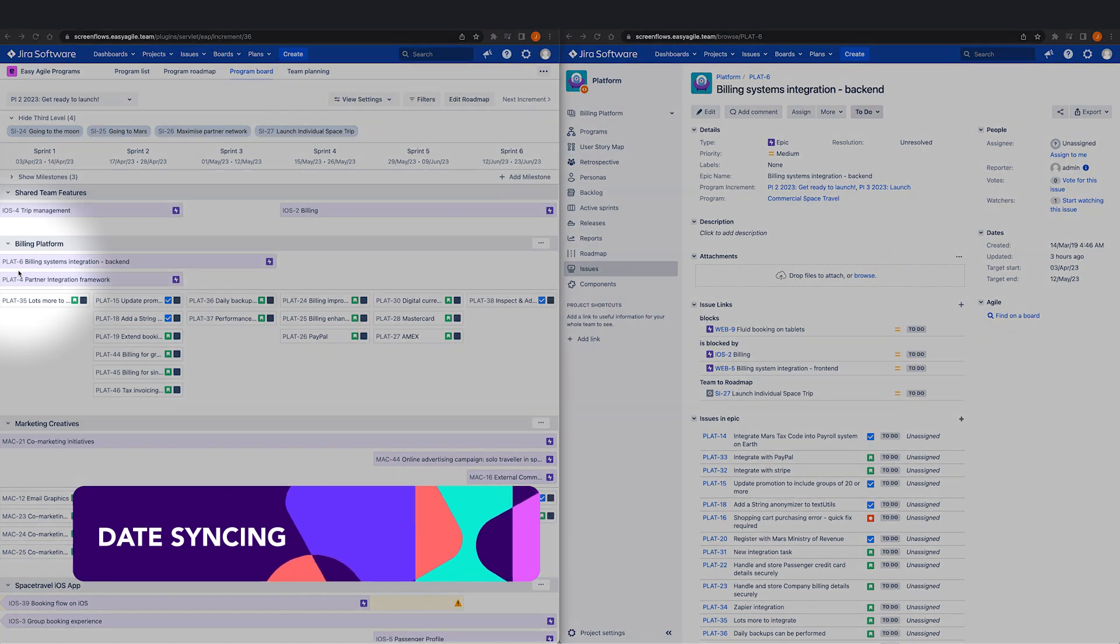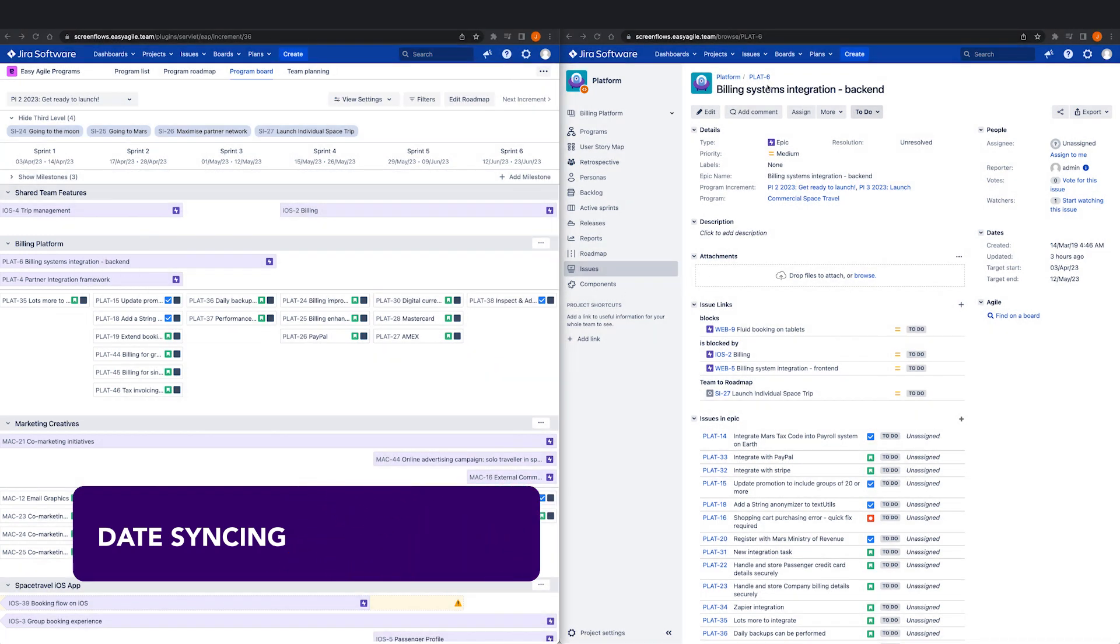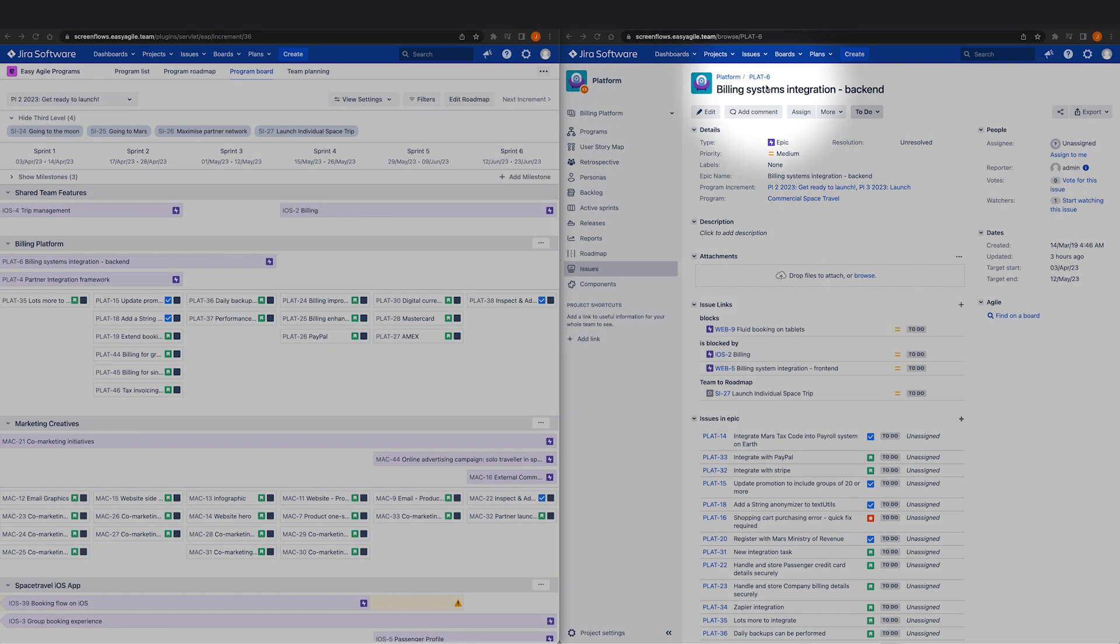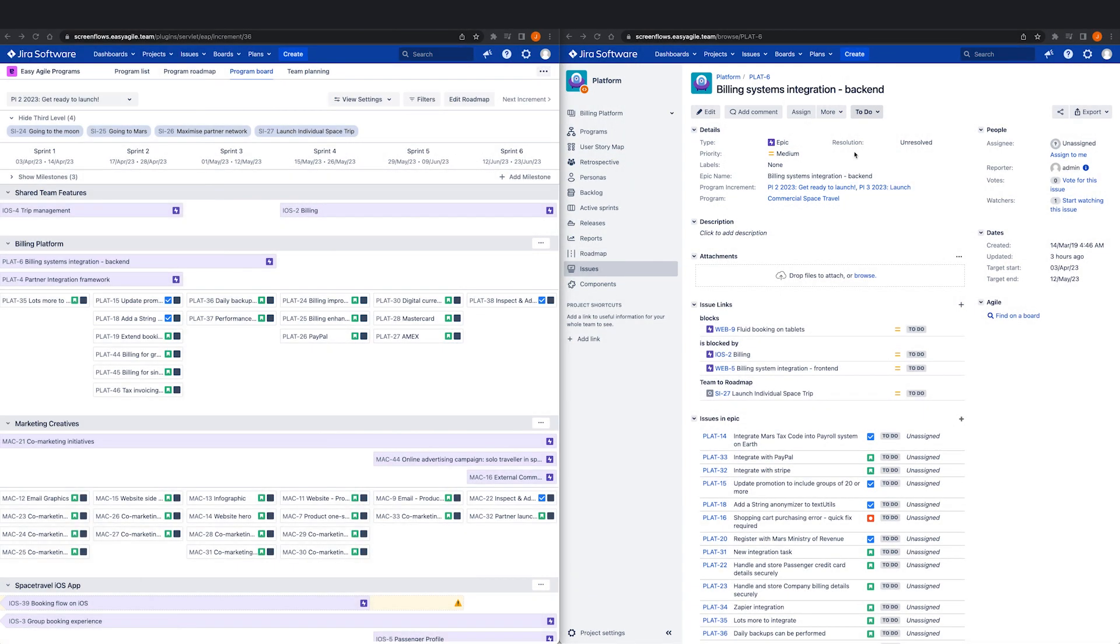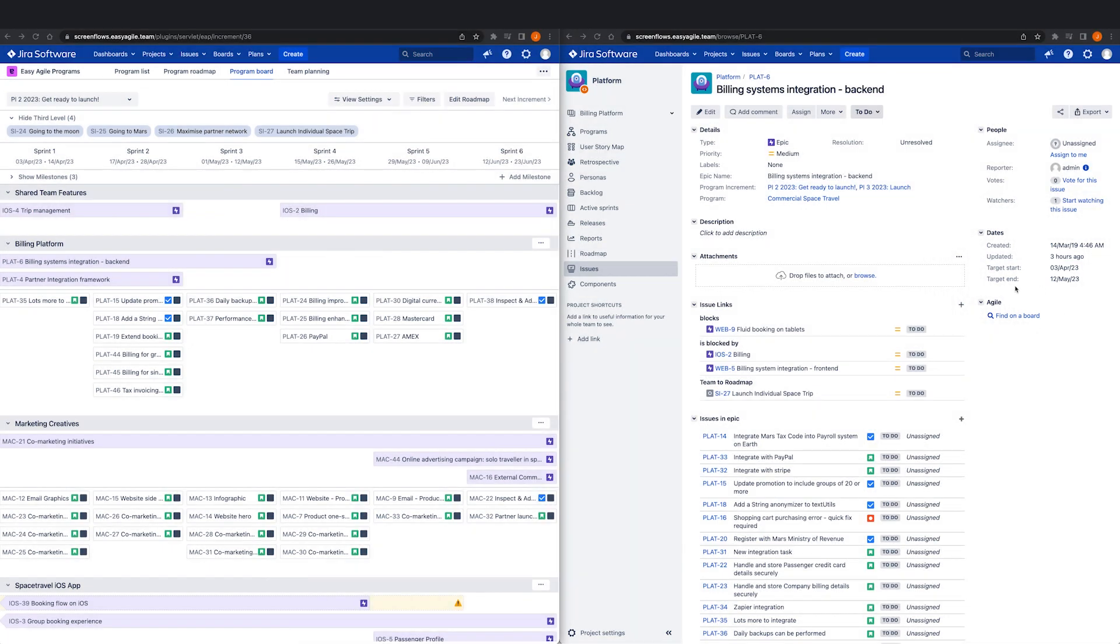If date syncing is enabled for your program, when features are scheduled or rescheduled in Easy Agile programs, these date changes are reflected elsewhere in JIRA. This means date changes are synchronized between Easy Agile programs, advanced roadmaps, and your source issues in JIRA.